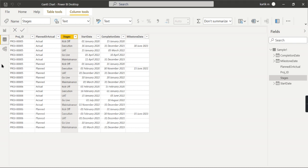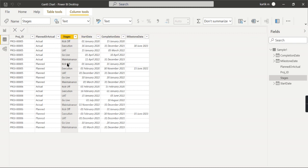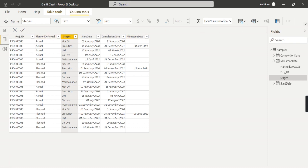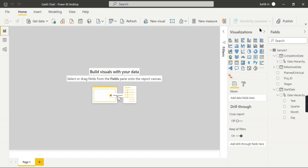For this Gantt chart to work, you need to have data like this. If in your source you do not have data in this format—instead, kickoff, execution, UAT, go-live are all available in columns like kickoff start date, completion date as columns—then you need to convert it into this way. Then only this Gantt chart will work.